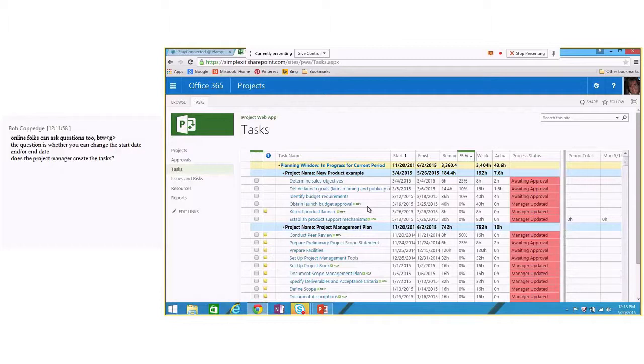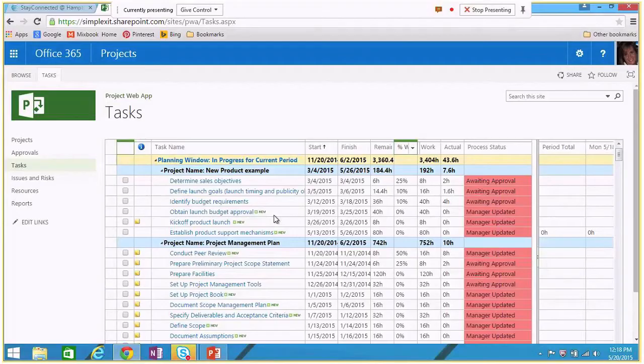And then depending on the project manager, you choose: do you want to plan on the worst case, the best case, the average, what have you. So a lot of project managers will just throw in some dates, and that's fine, but I think it's best if you can get the buy-in from the team members that are doing that task. So to answer your question, technically, the project manager is the one that actually types in the duration or the work that's estimated, but behind the scenes, it would be with input from the team member.